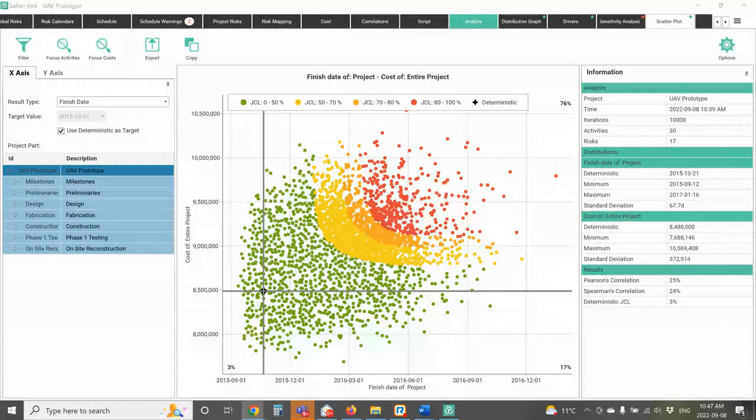To give you an example, when we used to bring files from P6 into Primavera Risk Analysis, we'd often get this cascading variation that would come in. And the reason for it was that P6 supported half hour calendars and Primavera Risk Analysis did not.